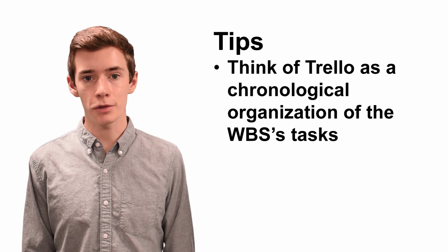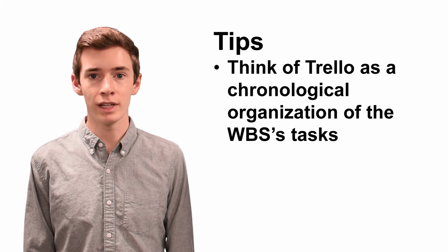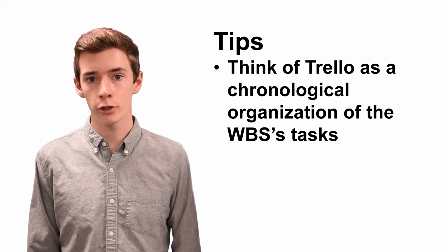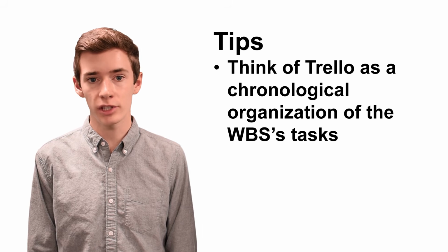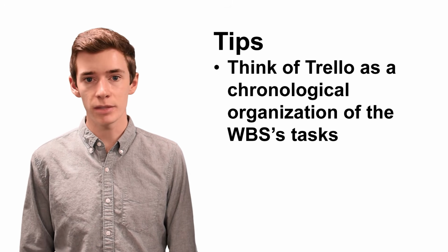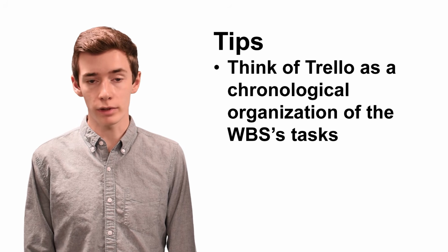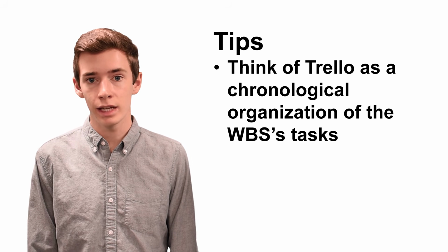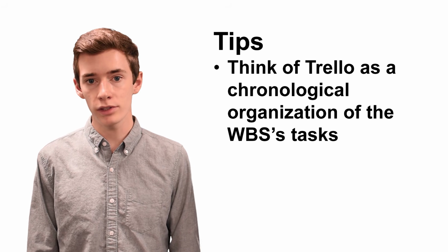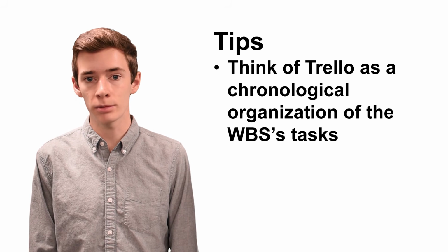Second, it's helpful to think of Trello as a chronological organization of the subtasks you came up with while making your work breakdown structure. The work breakdown structure serves as a decomposition of your project's deliverables into smaller tasks and subtasks, independent of time. The Trello board takes those tasks and subtasks and organizes them with respect to time. It uses deadlines and weekly goals to make sure you meet your due dates and deliver your project on time.